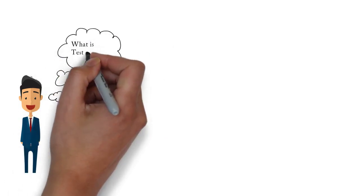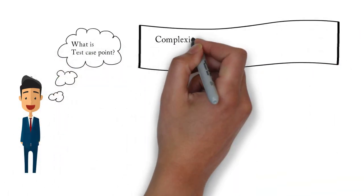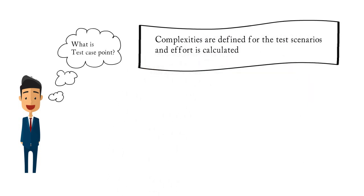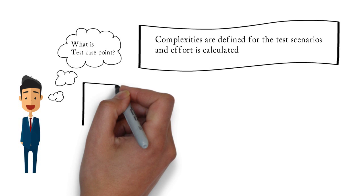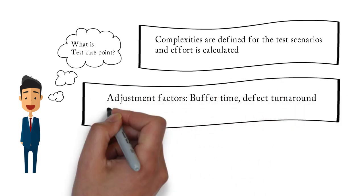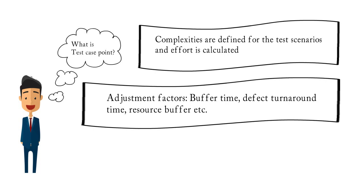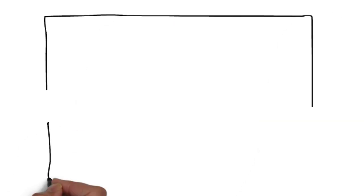The next technique is test case point analysis. Here we define complexities for the test scenarios that we have written, and effort is calculated for the test scenarios. In functional point analysis, complexities are defined for functionalities and functional points are calculated, but in test case point analysis, complexities are defined for test scenarios and test case points are calculated. In both techniques, adjustment factors like buffer time, defect turnaround time, and resource buffer can also be considered.